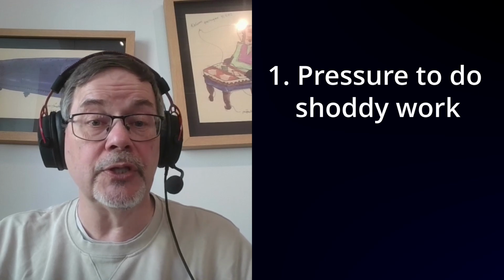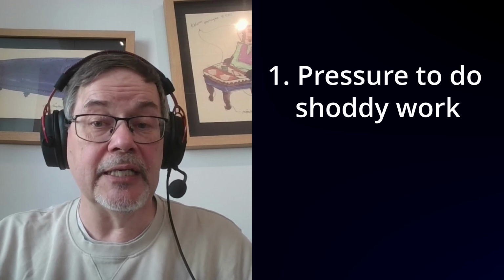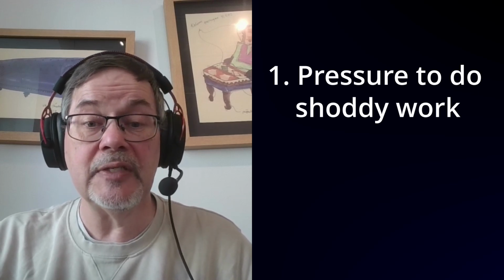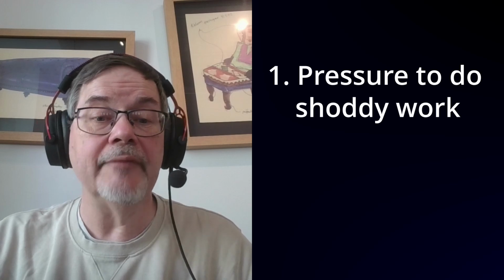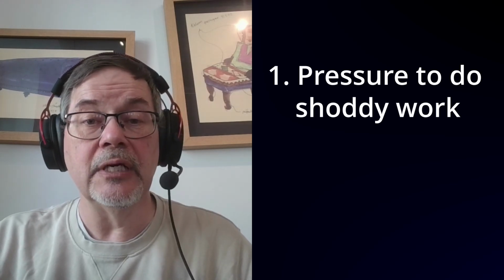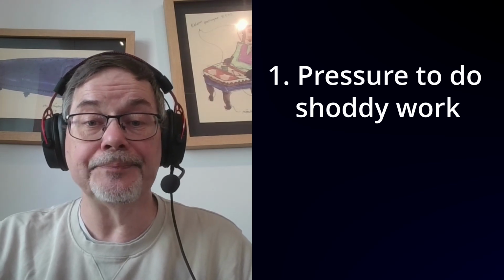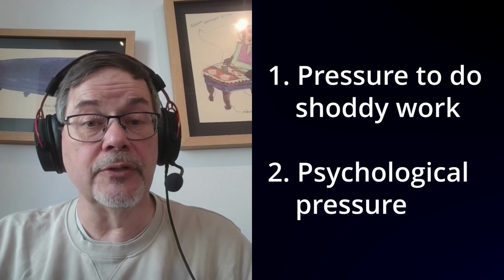What's worse, we will often underestimate how long work takes, which will lead to, one, pressure to do shoddy work. This causes technical debt to build up, and technical debt is economic debt. It will have to be paid sooner or later and with heavy interest. And two, we have psychological pressure.